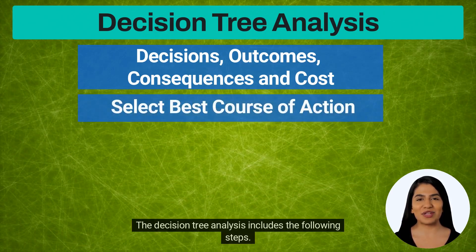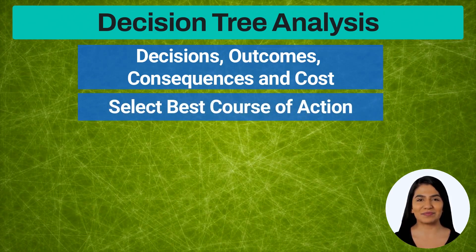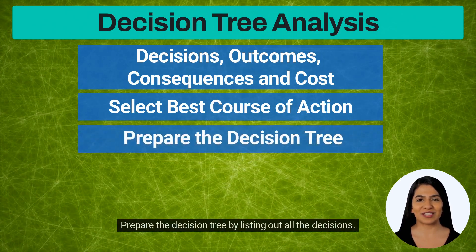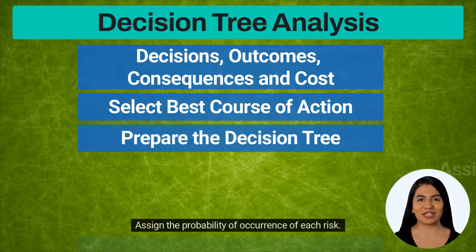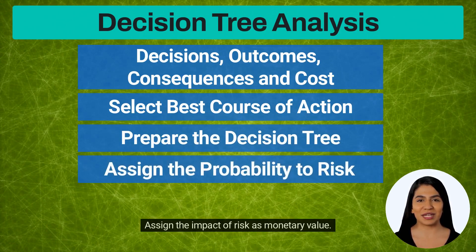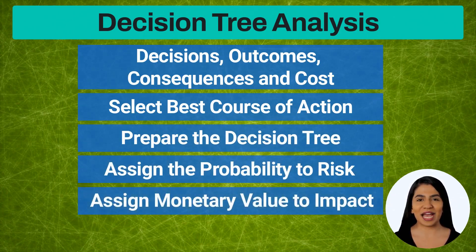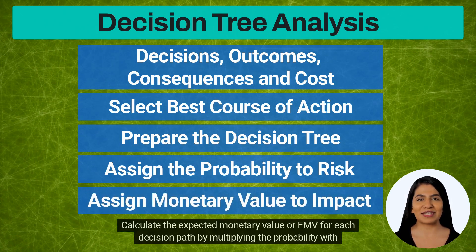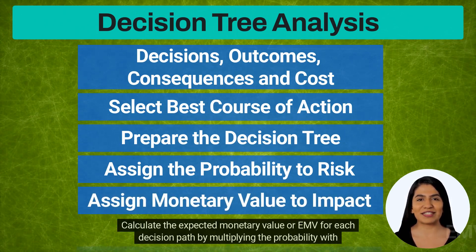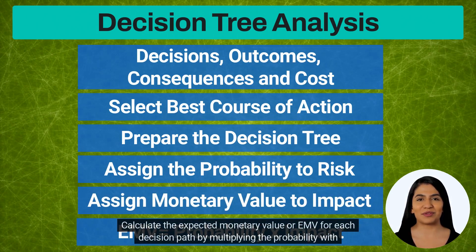The decision tree analysis includes the following steps: prepare the decision tree by listing out all the decisions, assign the probability of occurrence of each risk, assign the impact of risk as a monetary value, and calculate the expected monetary value, or EMV, for each decision path by multiplying the probability with impact.